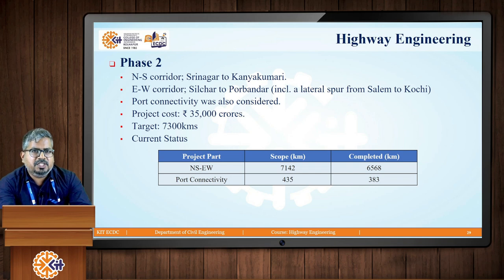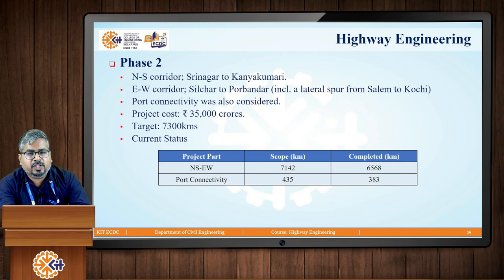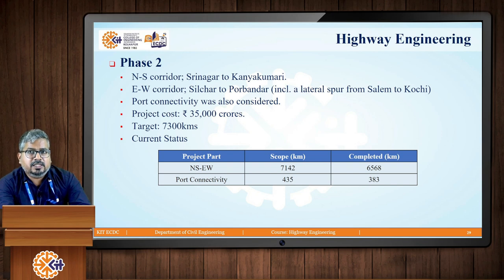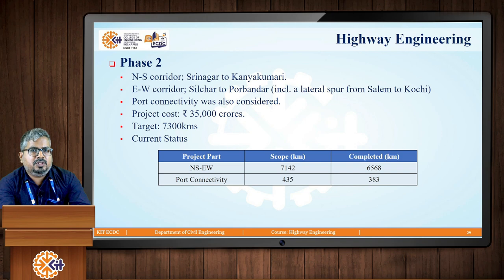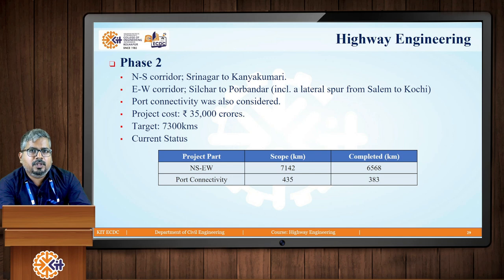Moving to Phase 2, this was majorly concerned with the North-South and East-West corridors of India. In the North-South corridor, the stretch from Srinagar to Kanyakumari was considered, while for the East-West corridor, the road stretch from Silchar to Porbandar was considered, which also included a lateral spur stretching from Salem to Kochi. Port connectivity was also given preference in this phase, and the estimated project cost was around rupees 35,000 crores. The target road length for this phase was 7,300 kilometers.